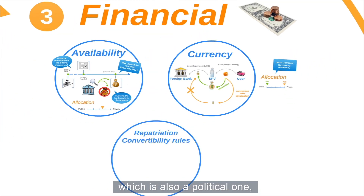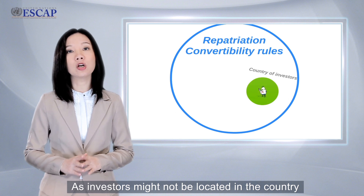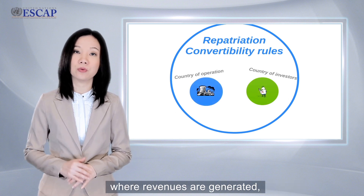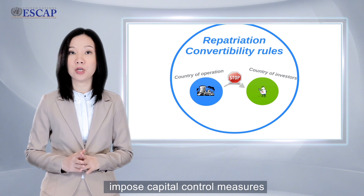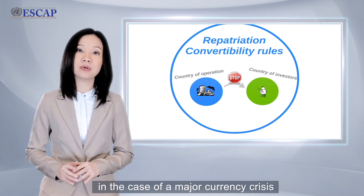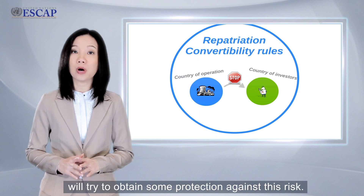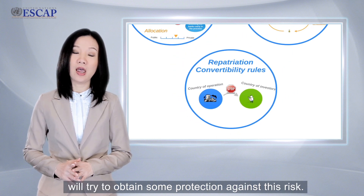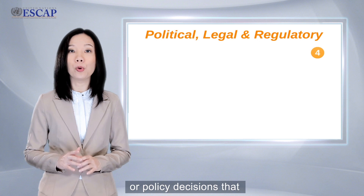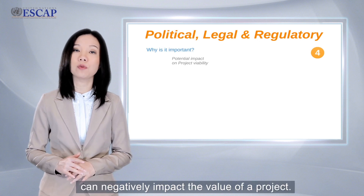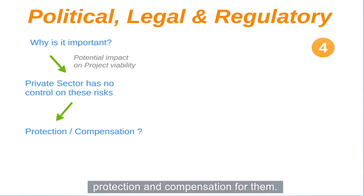The third financial risk, which is also a political one, is related to the repatriation and convertibility of revenues. As investors might not be located in the country where revenues are generated, money will need to be transferred abroad. However, a country might decide to impose capital control measures — for instance, in the case of a major currency crisis — thereby reducing the ability to make transfers. In emerging markets, the private sector will try to obtain some protection against these risks. Another set of risks relates to adverse changes in the legal framework or policy decisions that can negatively impact the value of a project. Having no control over these risks, the private sector will seek measures of protection and compensation, and if such risk is perceived as too high, there will be no interest from the private sector.